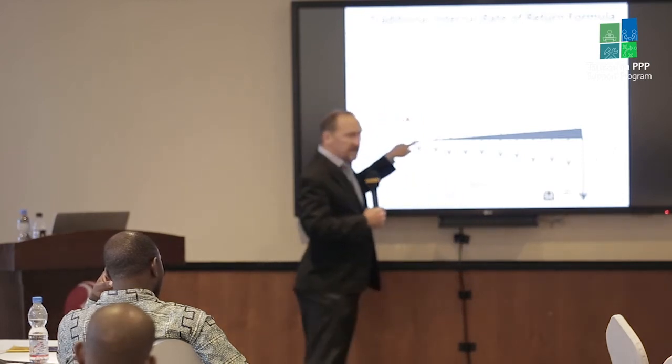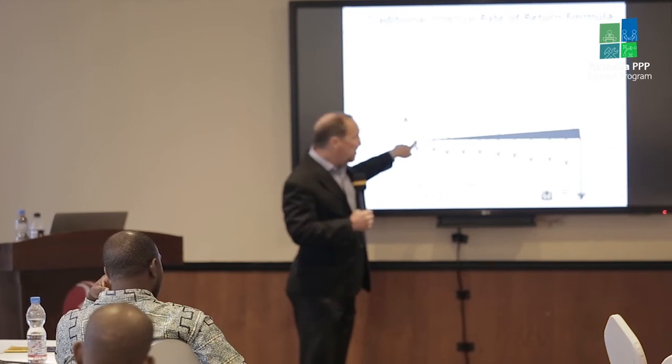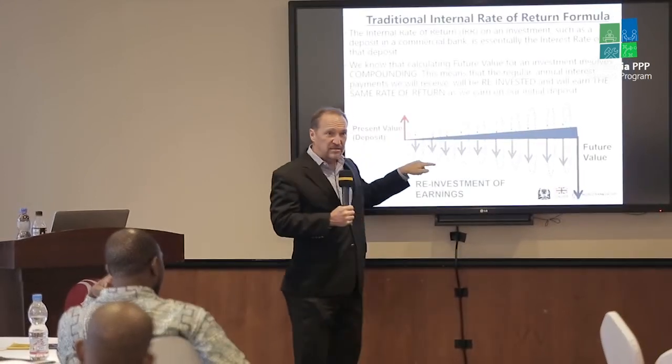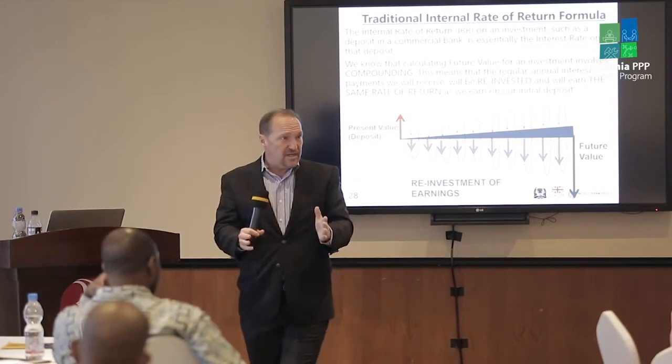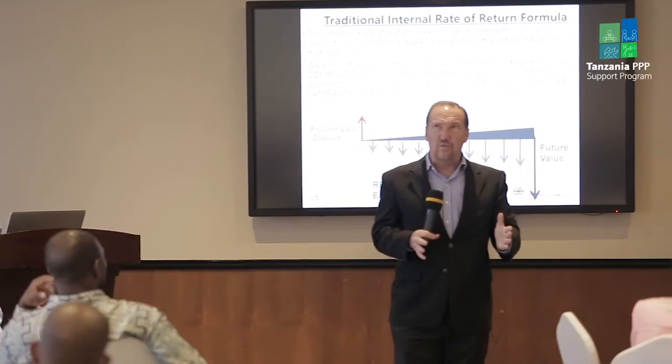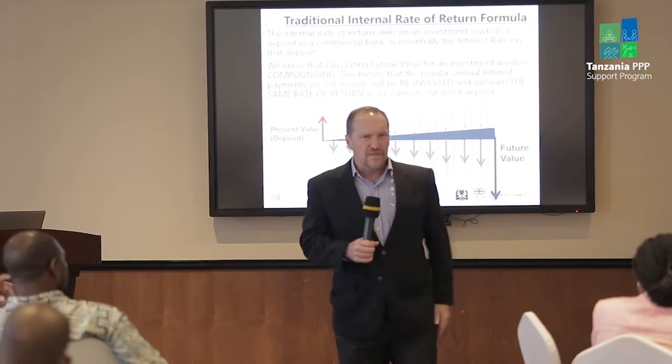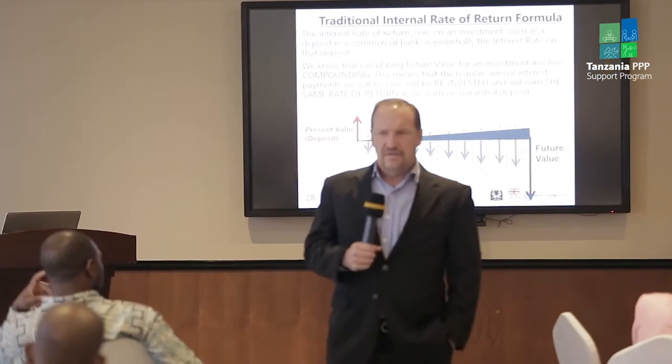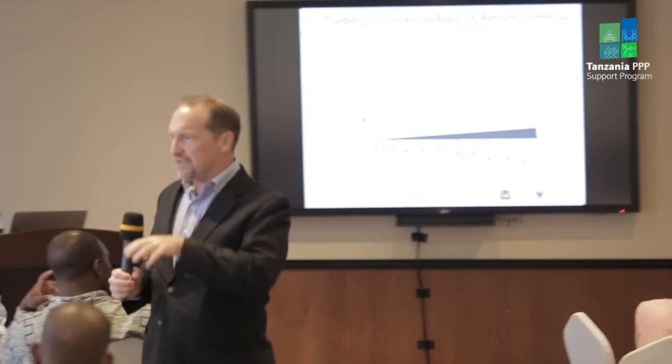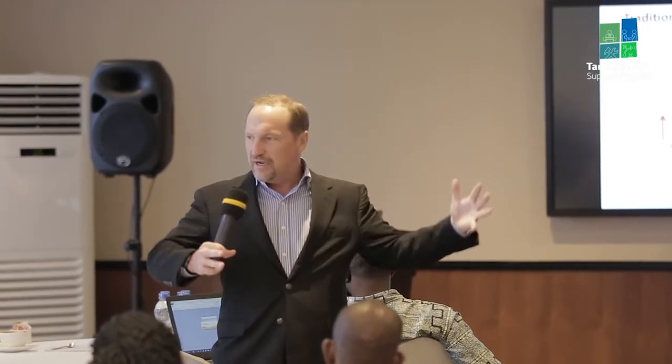Does the investor then say, okay, that first year's cash flow, I'm going to reinvest it in the plant so that in year one it's a 100 megawatt plant, in year two it's a 110 megawatt plant, in year three it's a 121 megawatt plant? Is that a realistic assumption? No, PPP contracts are fixed. It sort of says you provide the capacity, we'll pay you. There's rarely the option to reinvest your earnings in a bigger and bigger plant. It's not a realistic assumption.